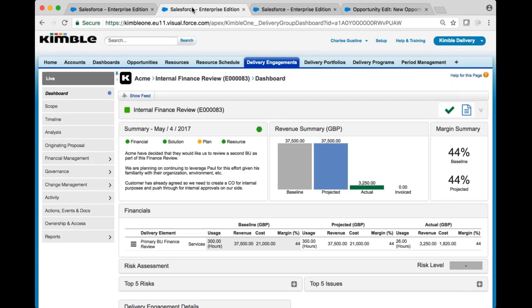So we're going to need to add additional resource on this engagement for another 160 hours of work. Some things to consider as you think of the decision tree that Jerry showed us. We want to track the margin for this change separately. We'd also like the resource to book time to a separate assignment. In fact, we might even need to use a second resource to get this done in parallel with other effort.